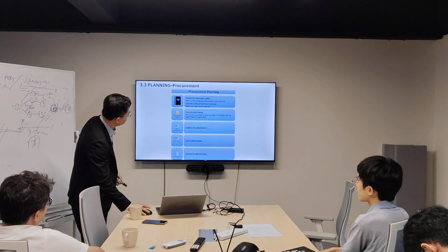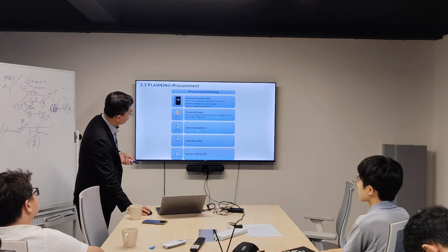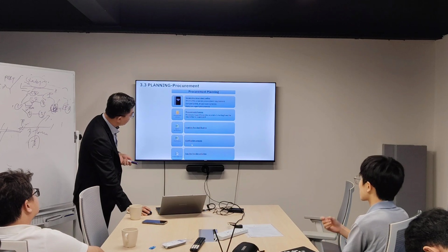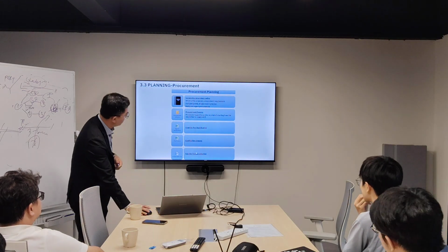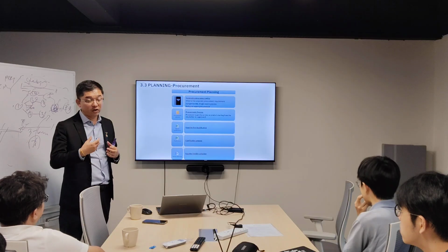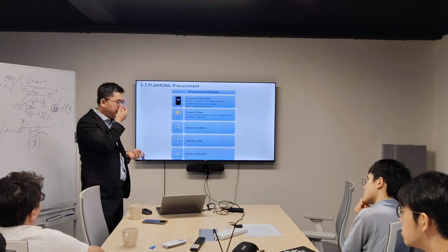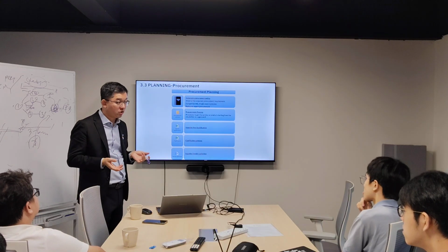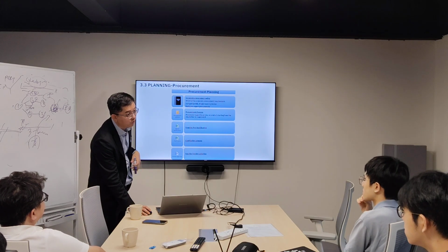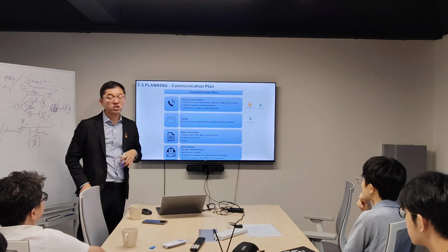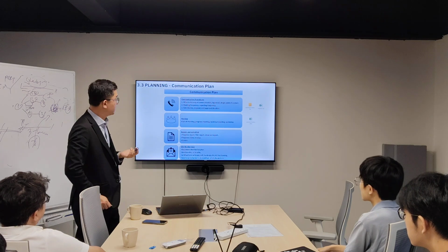And then these are basically the standard process. So we need to pre-qualify the supplier or contractor, and then, when we ask them for tender, have a qualification process, and then come up with the selection and vendor recommendation. But this one, unless you are working as a procurement manager or contract manager, I don't think I would like to brief in detail, because normally project management will not get involved except for procurement. But it depends on company policy. Some company policy will allow the project manager to be involved in the procurement process.